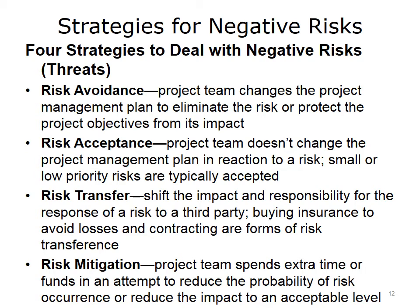There are also four strategies for managing negative risk. Risk avoidance requires the project team to change the project management plan to eliminate the risk or protect the project objectives from its impact. With risk acceptance, the project team chooses not to respond to the risk threat and does not change the project management plan — small or low priority risks are typically accepted. Risk transference involves shifting the impact and responsibility for the risk response to a third party; insurance is a good implementation, and you may also secure guarantees, contracts, and warranties. Risk mitigation involves reducing the probability of the event's occurrence or reducing its impact if it does occur.